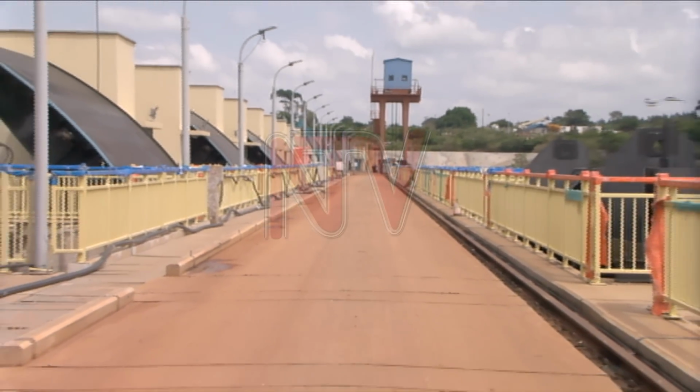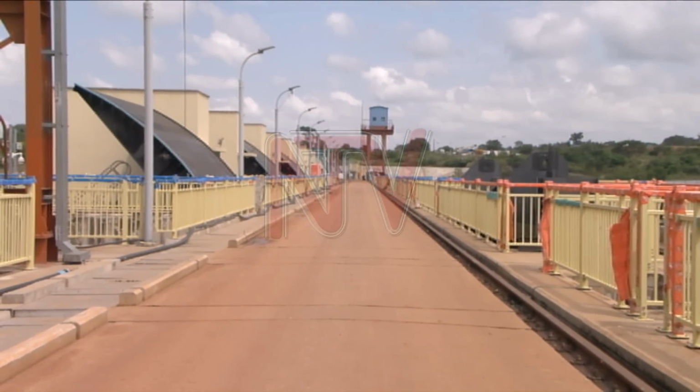Spending more time on the civil structure while fixing cracks, which took almost a year, posed more challenges. What that meant, the manufacturing schedule was still running on the original project schedule. Yet, the construction works for the civil structures, which house the equipment, had a delay of a year. So we ended up in a scenario where equipment started being delivered from China and other places where the manufacturing plants are to site, yet it was not ready to be installed. And that causes problems with lack of adequate storage, the storage condition, and ultimately it can result in deterioration. You have issues of corrosion, of rust.